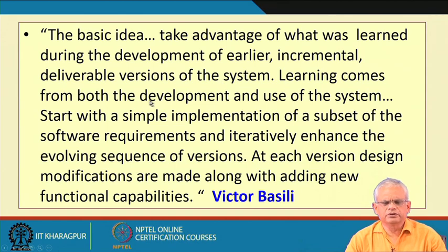Learning comes from both the development and use of the system. Start with a simple implementation of a subset of the software requirements and iteratively enhance the evolving sequence of versions.